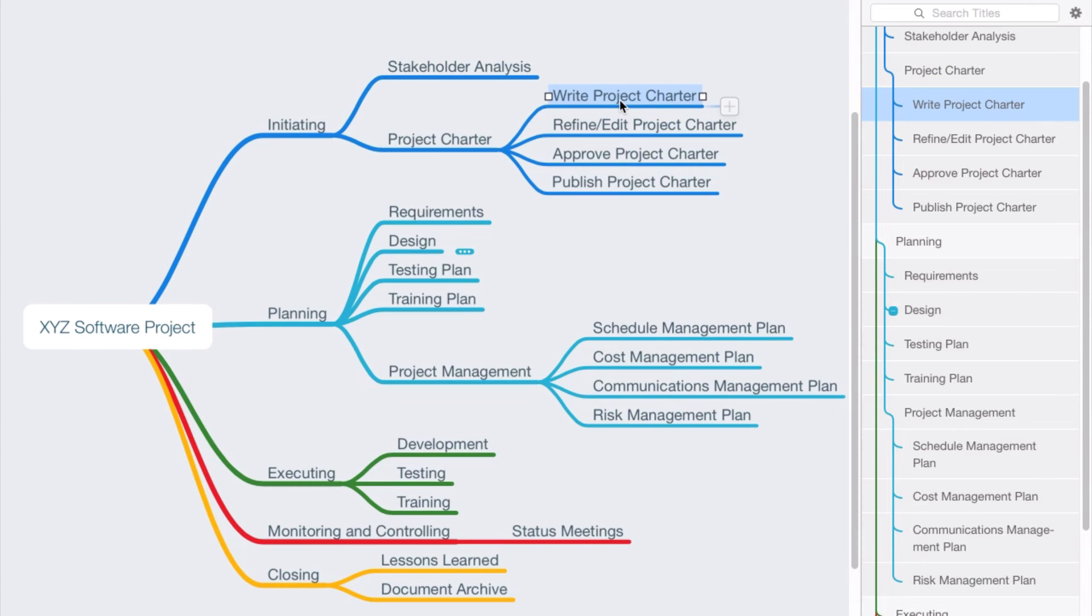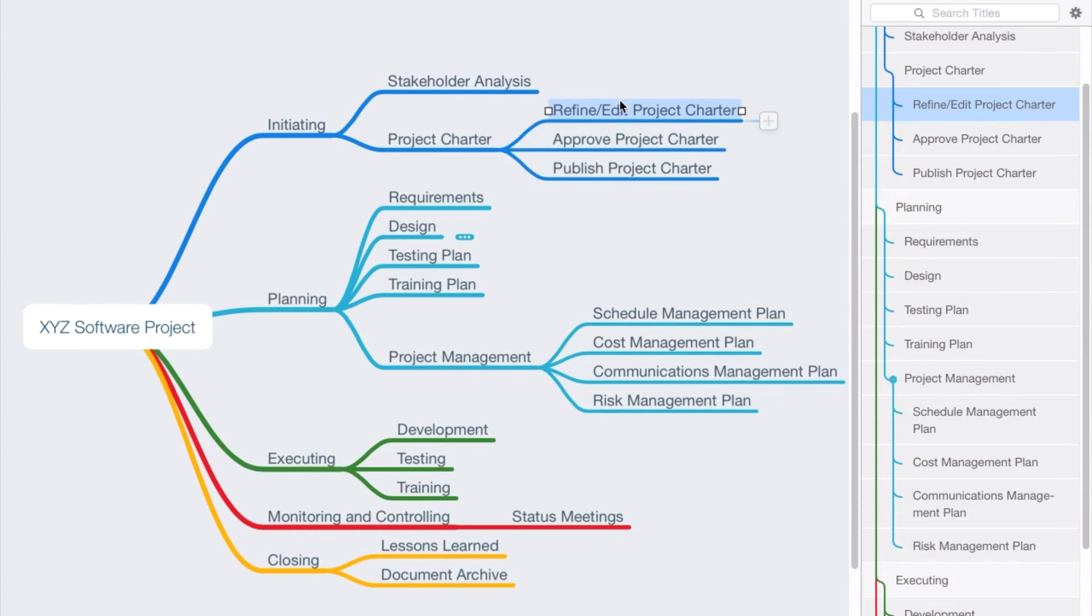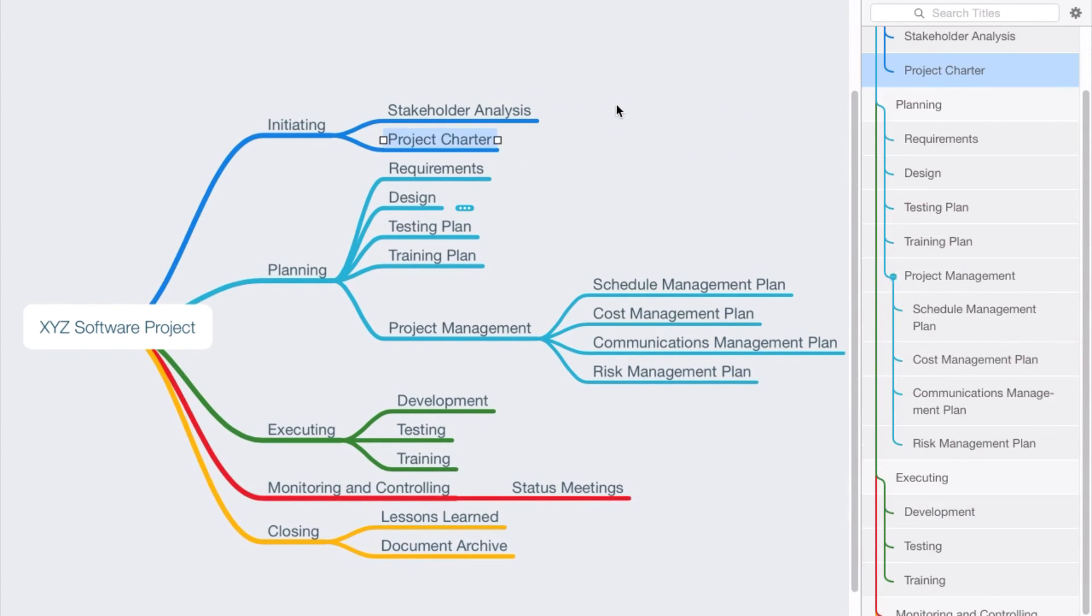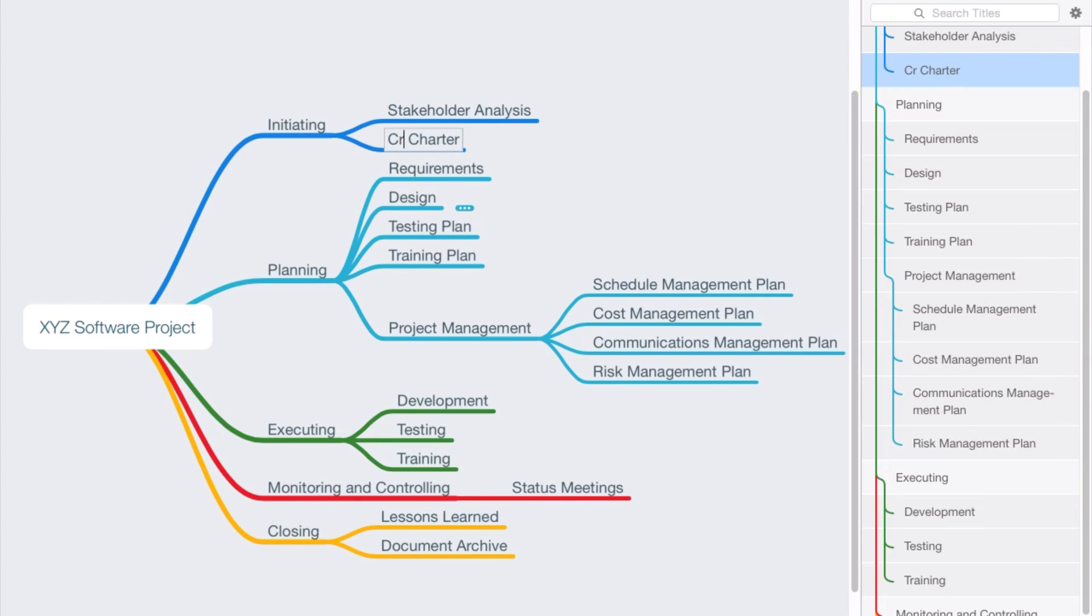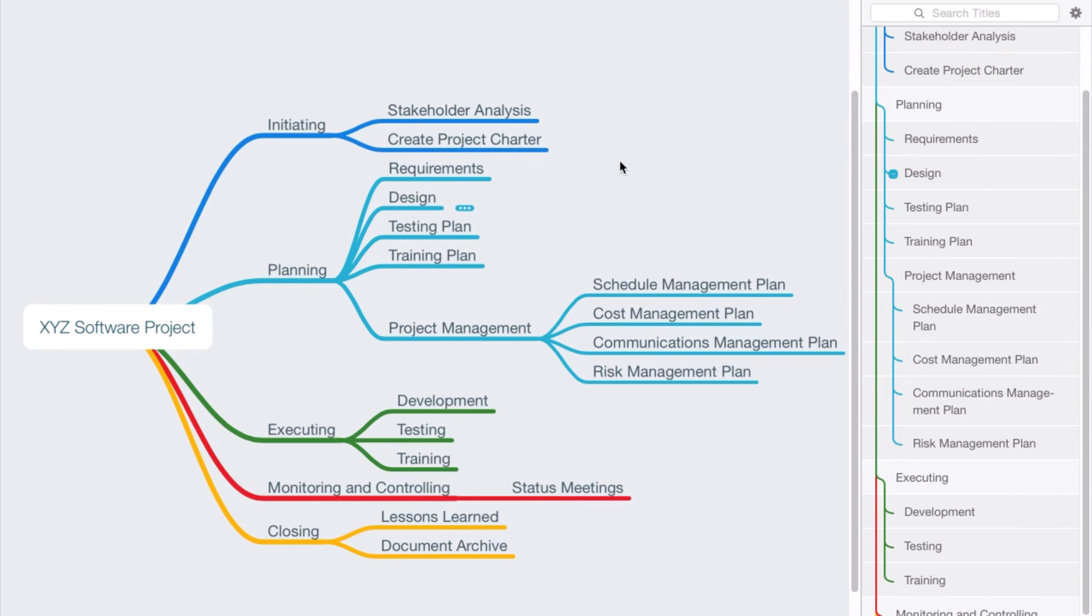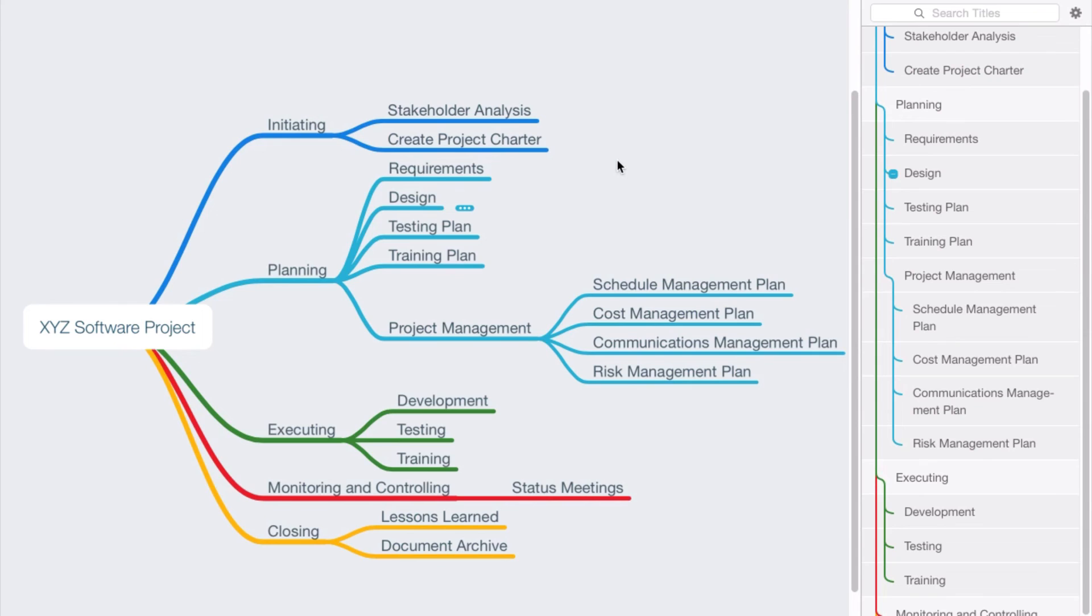Now I want to show you a different way that you might approach this. You could actually take any of these nouns and simply put a verb in front of the noun. So we just simply say create project charter, and that activity may be defined in a way that you know that it includes the writing of the charter, the refinement or editing of the charter, the approval as well as the publishing of the charter. That's completely up to you, but it's important that you've defined all the activities necessary for the project.